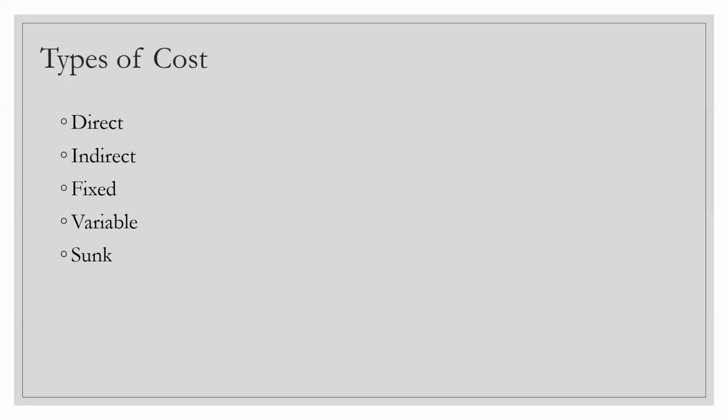what the use case was in the beginning of the project, and what happened in the middle of the project, right? So know that very carefully, what the question has to say to you, and accordingly you can put a check mark. But don't go with a closed mind that a travel cost is always an indirect cost, or always a variable cost and all that stuff. A travel cost is normally a direct cost as well, because if the client and the customer both have agreed in the beginning that we need some travel to ensure the momentum of the project, then definitely it's a direct cost.